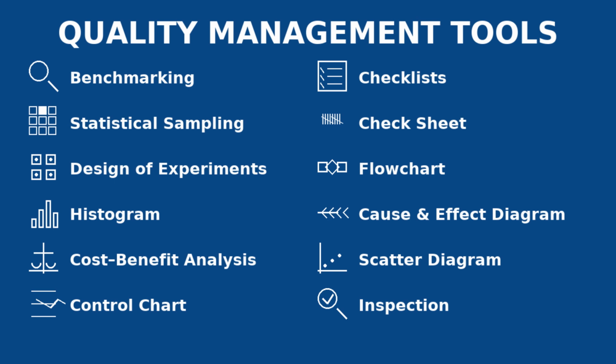from standards. The next project manager is actually comparing what tasks have been completed against what was documented in a plan. Can you guess what action this project manager is performing? He is using a tool called checklist. Checklist is a simple structured list to ensure consistent quality tasks or steps are followed without omission.